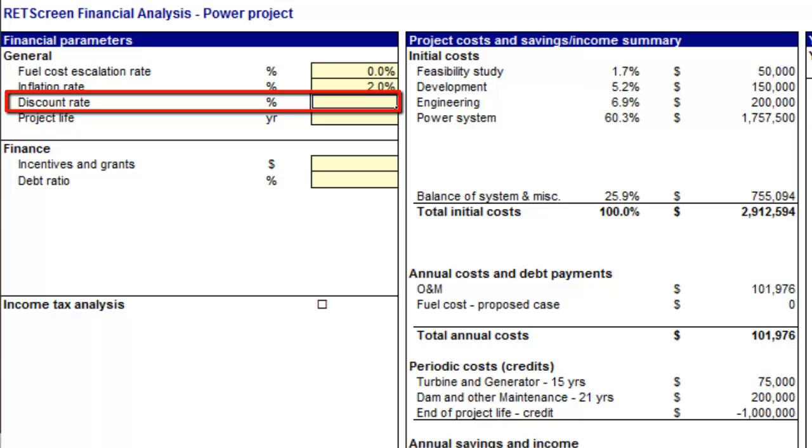The rate generally viewed as being most appropriate is an organization's weighted average cost of capital. An organization's cost of capital is not simply the interest rate that it must pay for long-term debt. Rather, the cost of capital is a broad concept involving a blending of the cost of all sources of investment funds, both debt and equity. The discount rate used to assess the financial viability of a project is sometimes called the hurdle rate, the cutoff rate, or the required rate of return.